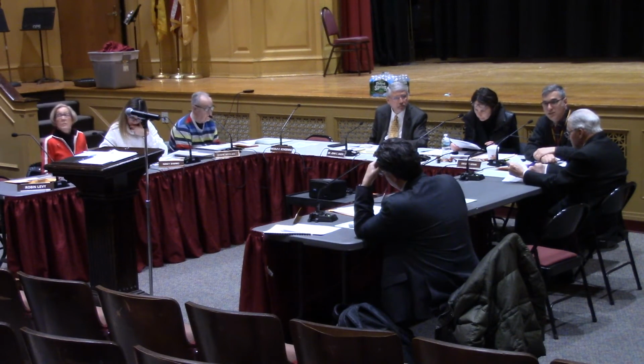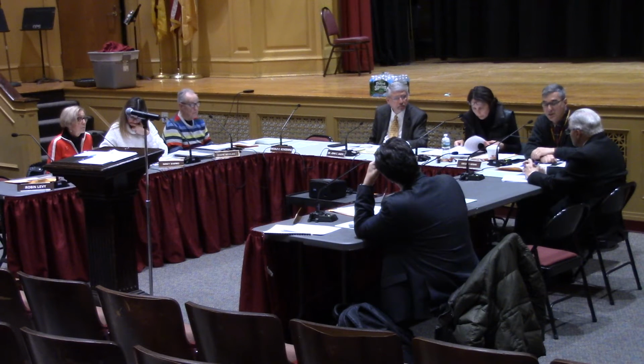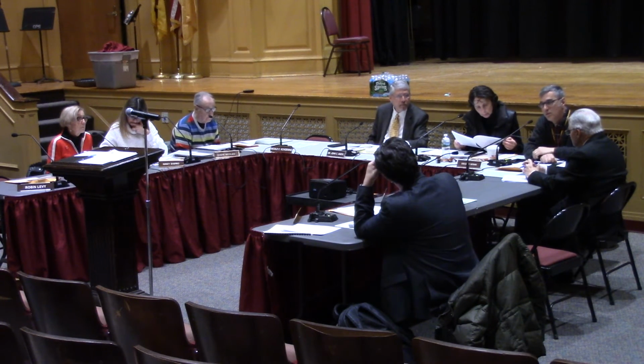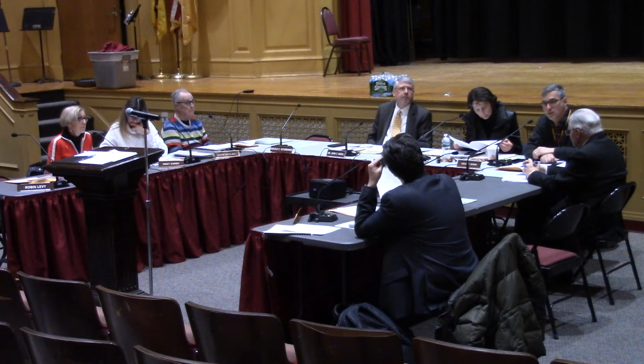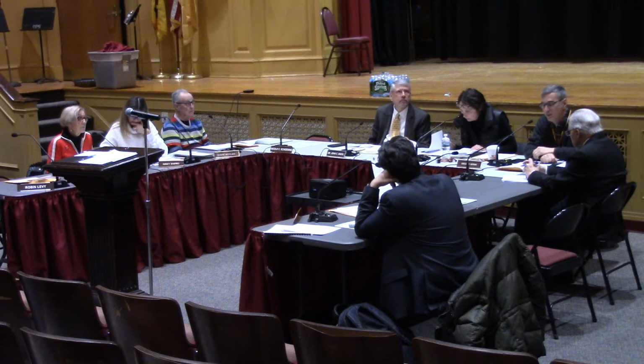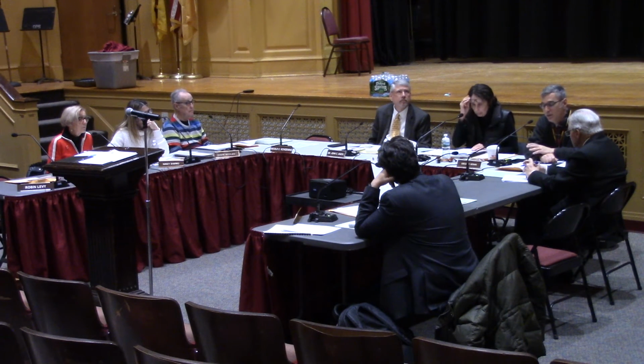But at this stage, that's all part of the scope, and it doesn't really require us to make that decision at this point. We just have to decide what other areas we're going to focus on, or whether we're just going to focus on this area and try to keep it at anywhere between 450 and 600K, keeping in mind that there's going to be other costs that we don't anticipate, such as possibly redoing the HVAC.